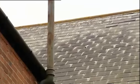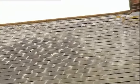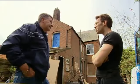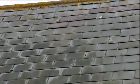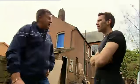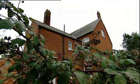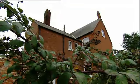I mean, cost-wise, you're looking at probably about £3,500. And to actually re-roof the place was certainly wasn't anything I budgeted for. I mean, I'm just giving you some advice, really. Yeah. But, you know, you're chucking money away when you keep repairing it. Having a budget of £12,000 was always a recipe for disaster.